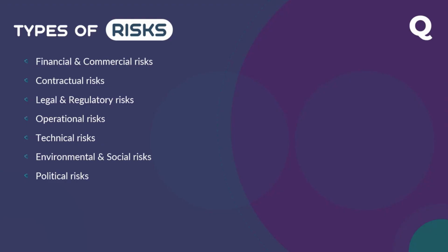Now, when you open the contract, you will be looking at LD, because that's not just commercial, that's a contractual risk also. You have to see what amount of LD he is going to put on me in case of delay. In the worst case scenario, if I delay the project, how much is he going to put on me? Guys, sometimes some clients will put unreasonable LD, and when somebody puts unreasonable LD, you should tell them that this is not possible. Like imagine somebody putting 1 million LD per day for a 10 million project. That is unbelievable. You cannot do that.